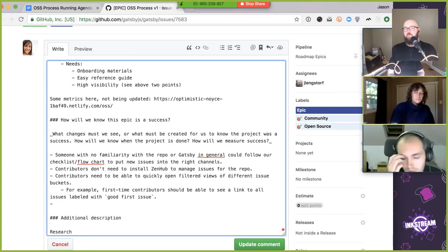Yeah. So this would be a shift in the way that Mikhail, or maybe Mike, would work. When issues come in, instead of putting them into a personal backlog and tackling the harder issues, they would get escalated as needs core team review or needs core maintainer review.